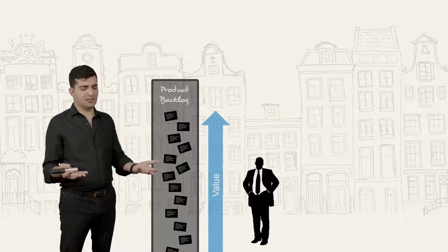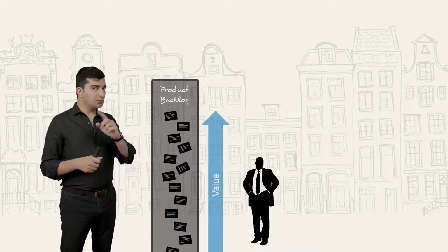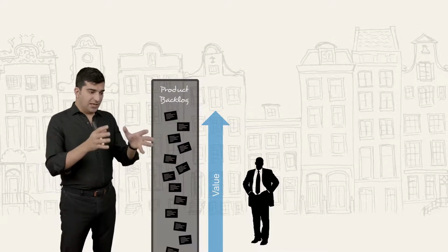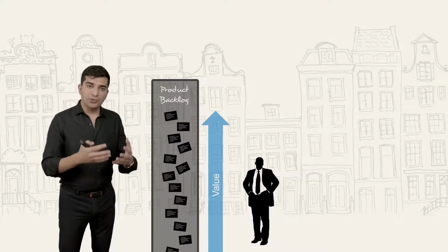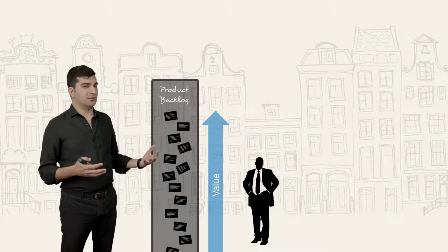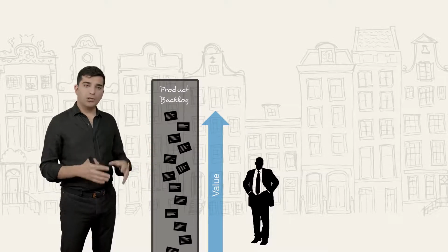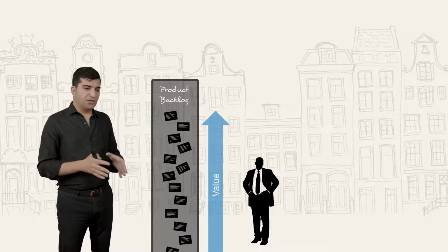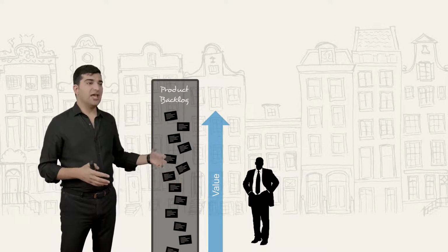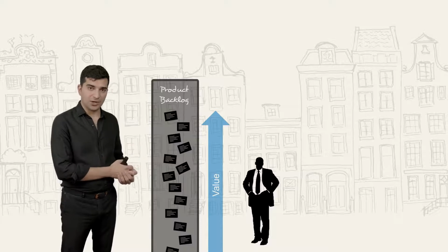That's basically the concept of agility, which we will talk about in the next iteration. But anyway, here you don't even try to create a complete product backlog because we really know that it's not going to happen. What you would do is spend just a few days creating a few items there, enough to start the project.